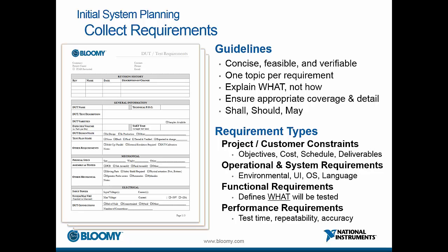Finally, language is important when defining requirements. Shall indicates a critical, contractually binding requirement that cannot be neglected in order for the system to be accepted. Should indicates items which are fairly critical but may be excluded under extenuating circumstances. Finally, requirements that use the may verbiage are nice to haves and can be included if time and budget allow. Also note that should and may can be used to identify suggested implementation details.